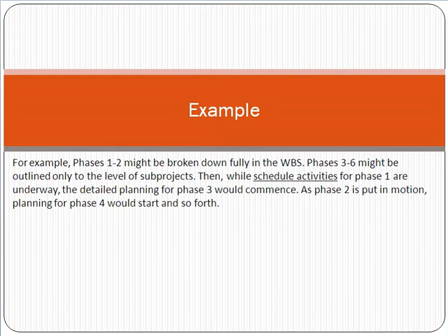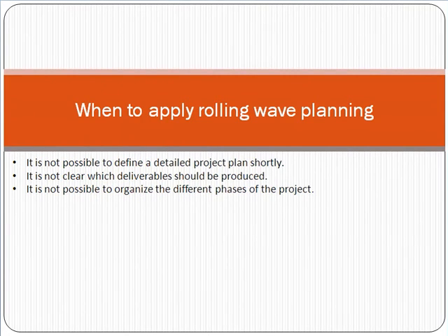So if you are in the planning phase, you do the detail level planning, like how you do the scoping, functional specification, and technical specifications. And for the rest of the phases like development, testing, and production deployment, you can do it later at some particular time. That is called the concept of rolling wave planning, friend.